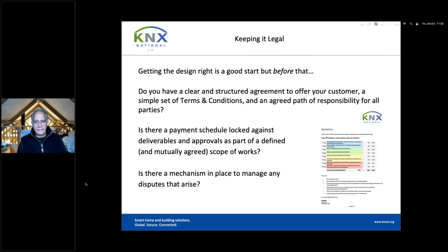It's important to agree and sign a contract for the scope of works, which includes a dispute resolution provision, which details a process for mediation if anything is required and something has gone wrong. Contract can be a straightforward letter. It can be based on the JST small works. It can be the more complex subcontract element of a JST 84. Its form is necessary to say that we will provide this list of services over this period of time for this amount of money in this fashion.